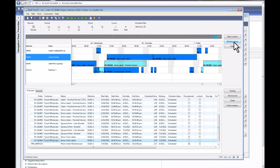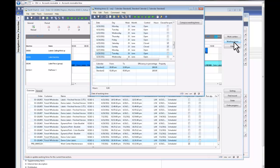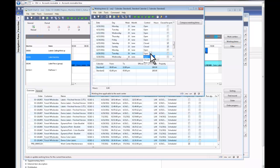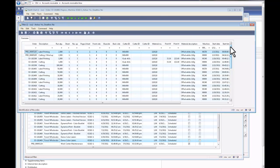Or I need to stop the machine for a certain period of time and I don't want people to schedule my blocked resource. I can click on working times and stop that period which I don't want the machine to be based on. Other functionalities here are I can click on the filter function.